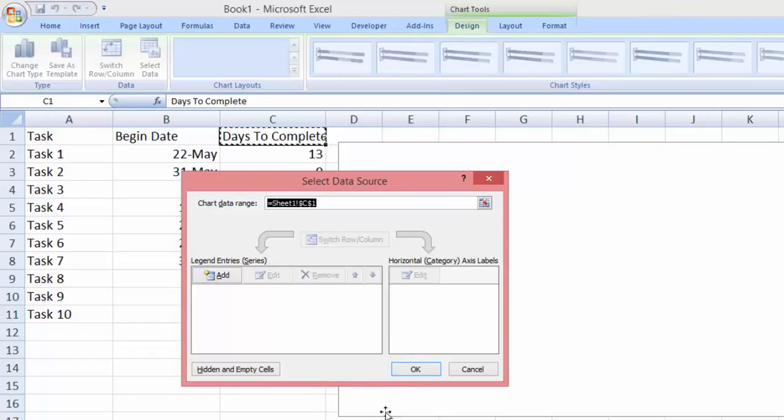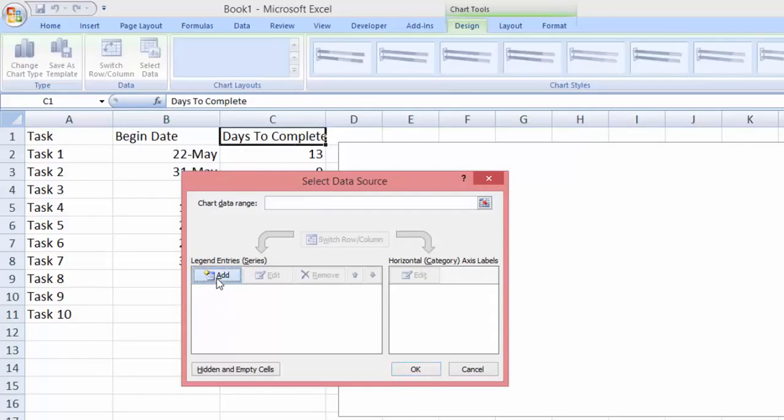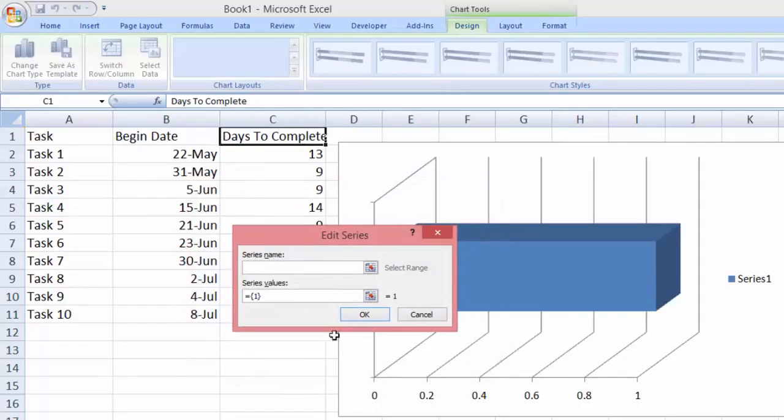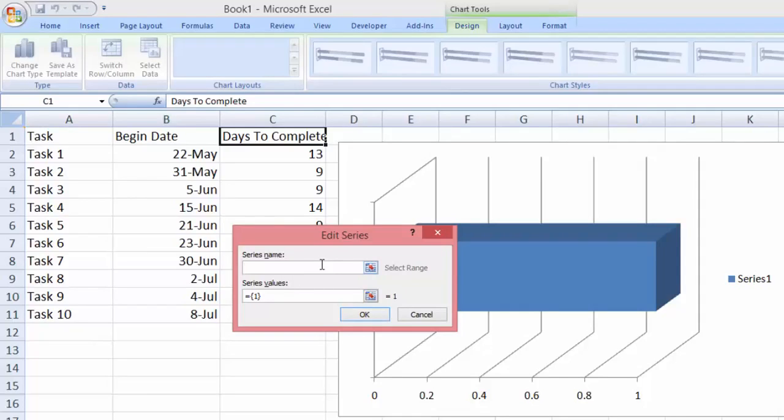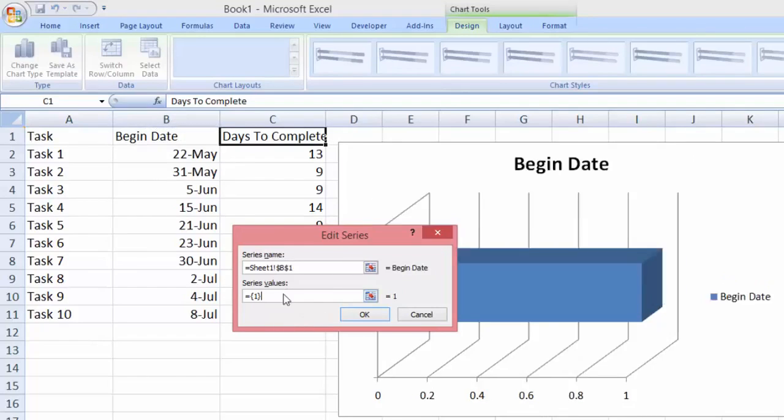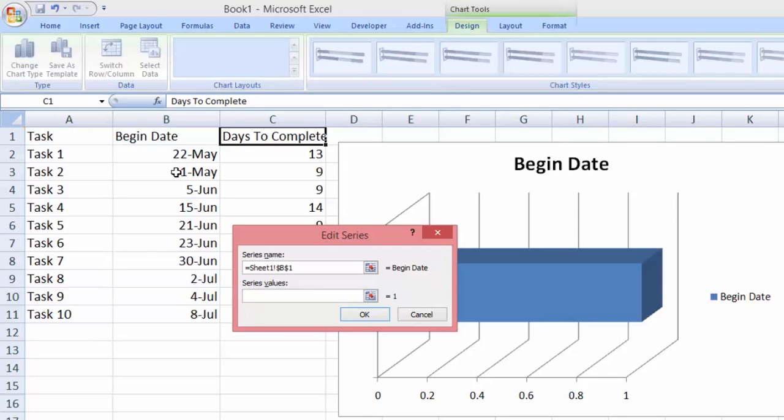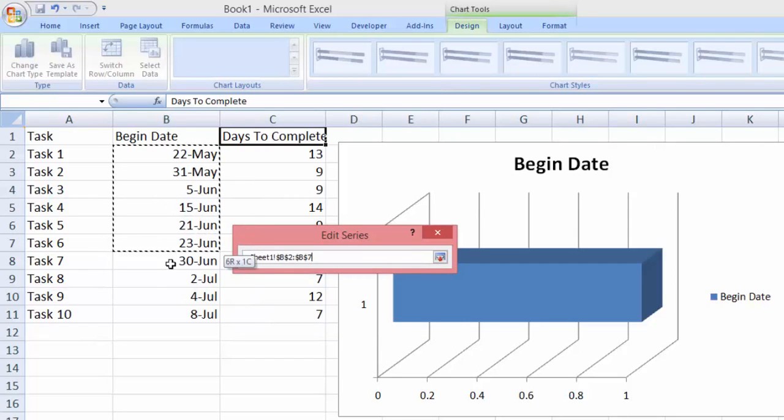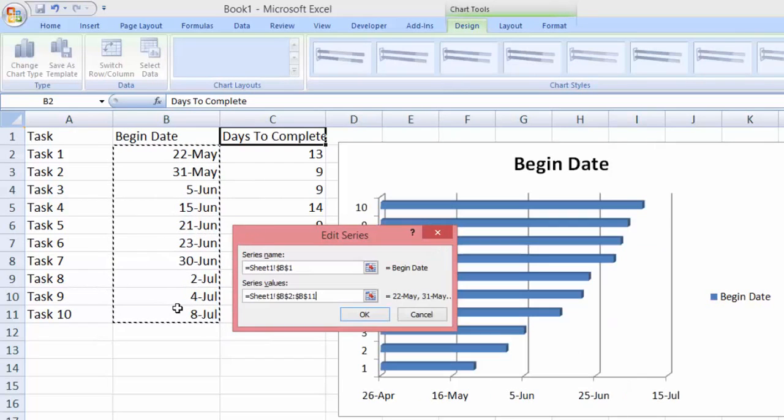As you can see here we have a select data source dialog appearing. Right now we're going to go to the legend entries and we're going to click add button. So the edit series tab will appear. For the series name we're going to select the begin date, and then for the series value we have to remove the default and we're going to select the range of data of cells that is in the same column as the begin date. So in this case is this one, and we're going to click OK.